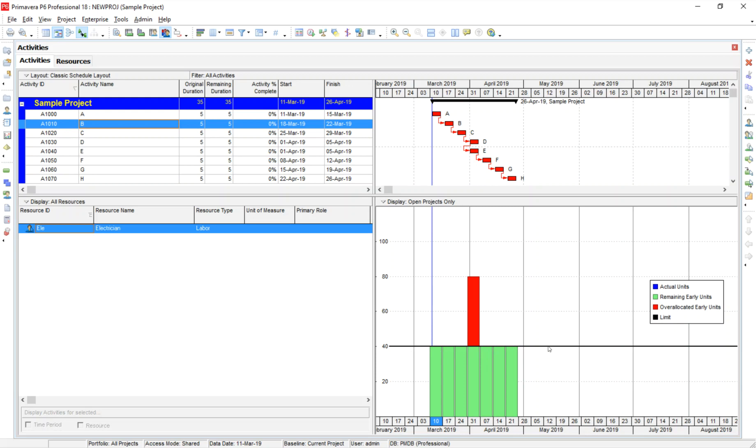Notice the straight line. Some of you say, well, how come my line is not straight? Likely what's going on is you have your lowest level of your time scale is not a week, which is fixed at 40 hours. It might be at a month, which the number of work hours and work days in a month varies by month to month. All right. So good.